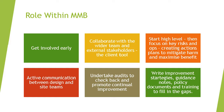So how do we manage environmental risks and opportunities day-to-day? My team and I get involved in projects early and work collaboratively with design engineers, clients, feasibility consultants and regulatory stakeholders. Our approach to environmental risk management comprises a high-level review at programme level, followed by active management of an internal tool called the QES workbook, in which quality, environmental and safety risks are captured. I meet with project managers to discuss and record environmental aspects and impacts for a given project and confirm next steps — which might include specialist environmental reports, survey work, or the procurement of licences and consents.